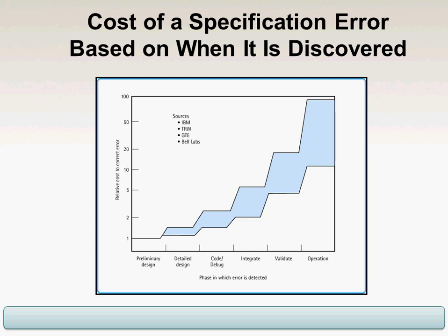And again, this is some of the rationale of the agile process. If we can do multiple passes through this, we can do a pass through everything, and even if we catch it later in the project, fixing it is not as difficult as if we let that error continue to persist, and then we deliver all of the errors at once. So you want to catch errors early, and if you're not doing agile, then it's probably a good idea to have a quality assurance group looking at the deliverables and reviewing each of the artifacts that come out of the phases.